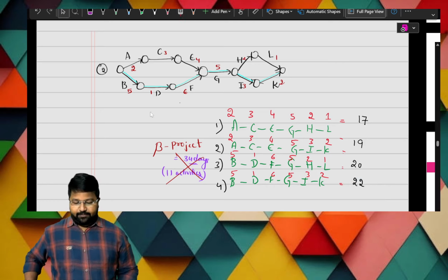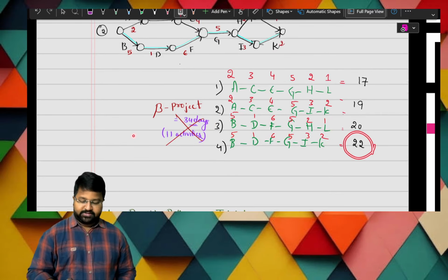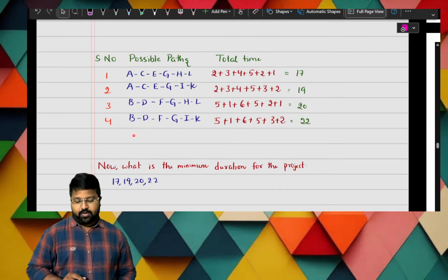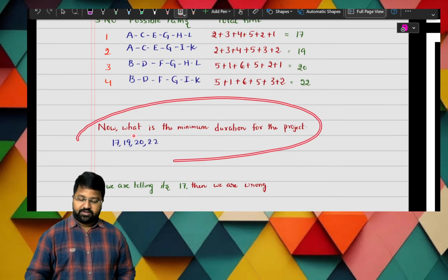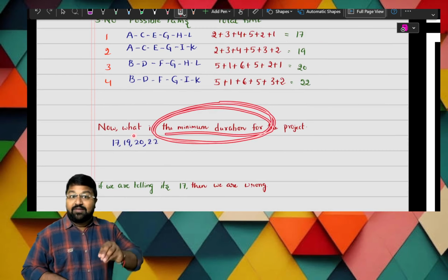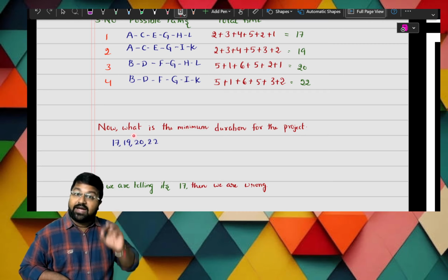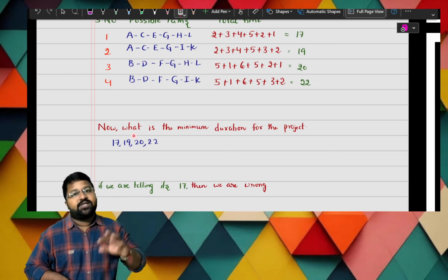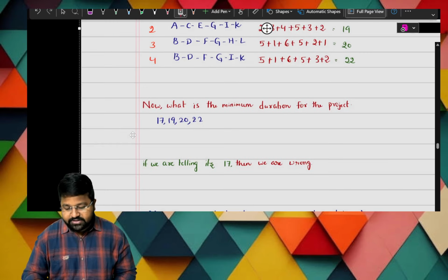So let us see, buddy. 34 days is wrong. 22 days is our project duration. What are the paths we are having? There are four paths: 17, 19, 20, and 22. Now, what is the minimum duration for the project? He's asking for the minimum time taken to complete the project. What is that, buddy? The maximum time is the minimum duration.